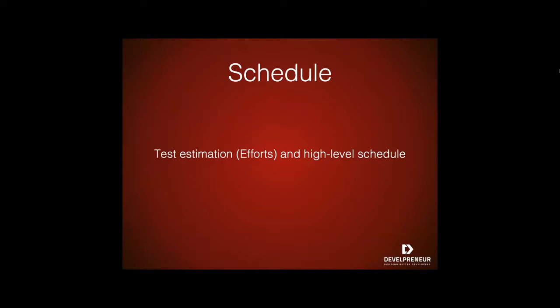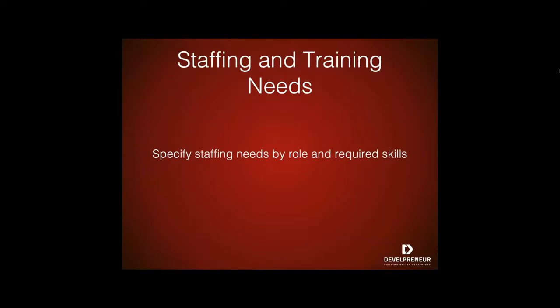For example, if system testing is to begin after delivery of the final build, then system testing begins the day after delivery. If the delivery is late, system testing starts from the day of delivery, not on the specific date. Staffing and training needs.